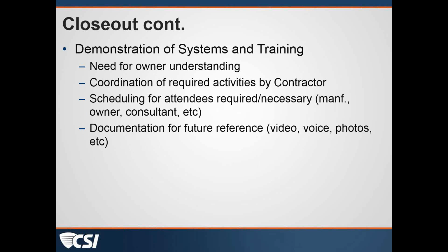This is a phase of the closeout process that is coordinated by the contractor, who's responsible for scheduling and being sure that the attendees that need to be there are actually there, and that, as we talked about with the O&M manuals, the tools are there, the syllabus, if you will, for what this process is about, but also the documentation in place for future reference.